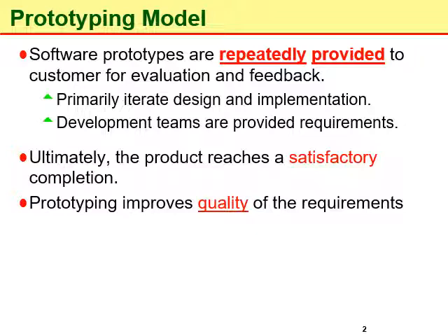Of course, if such requests arise in the later stages, then they can increase the cost of the project exponentially, and there are also chances of degradation of the architecture of the system, because most of the product is complete and we have to accommodate the new change.